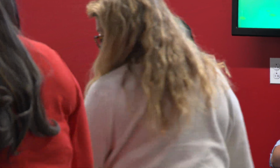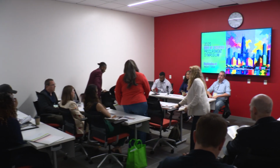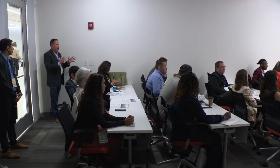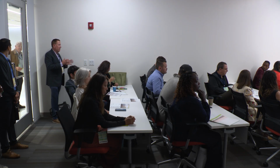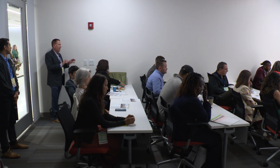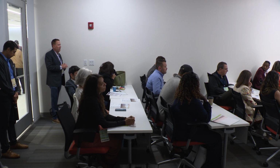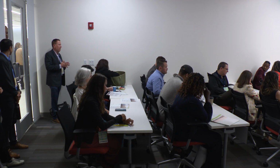Yeah, I mean, we sometimes call it more like a capability assessment. Really it's finding the right size project for each bidder. So when we're looking at the pre-qualification, we can only succeed if all of our trades succeed. So we need to make sure that they're not going to overextend themselves and bid a project that maybe is too large for them. That's a one-on-one open discussion with our procurement team to really guide you in the right opportunities, because we'll break out as much as we can, but if the job's a little bit too large, we'll have that conversation with you, and you'll understand where we're coming from, and trust me, you'll appreciate it in the long run, because it really sets you up for success on your first job.